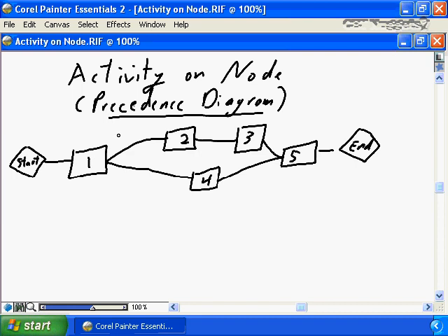This is depicting the most common style of finish-start, but if appropriate, you could say this is a start-start and this is a finish-finish type of dependency within your activity on node dependency diagram. Again, activity on node is what your project scheduling software will draw for you, often called the dependency diagram.